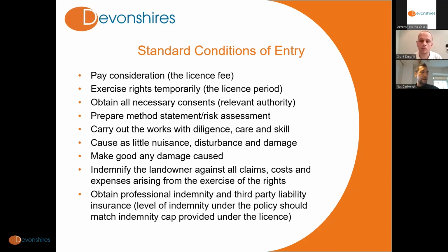You'll usually be under an obligation to carry out the works with diligence, care, and skill, and also causing as little nuisance, disturbance and damage to the property as possible. And you'll usually also be under an obligation to make good any damage caused. This would be to the licensor's reasonable satisfaction and often at the licensee's sole cost. That's what we would expect.